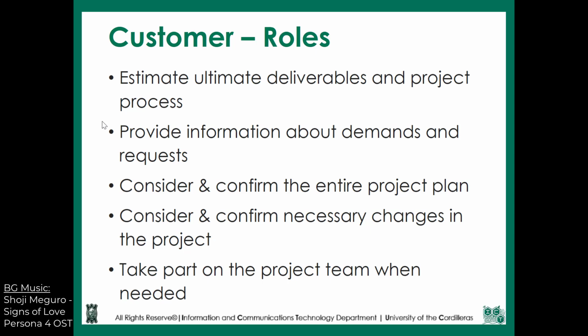Next one, they also consider and confirm the entire project plan. Later on, we're going to have a topic on the project charter, and they are the ones who will be approving that one. They will also consider and confirm necessary changes in the project. This is more down the line around execution and monitoring of a project. If ever there are changes due to changes in scope or maybe some unexpected twist of events, they are the ones who will be considering and giving necessary changes. In some cases, they are the ones who are initiating changes within the execution and monitoring stage.